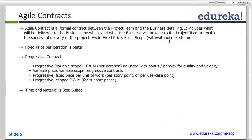There is another sizing method called T-shirt sizing. If I have a huge requirement, I call it XL. If it's a small requirement, it would be Small. So we have Small, Medium, Large, XL, and Double XL depending on how big the project is. In numbers, we generally use the Fibonacci series, which is 1, 2, 3, 5, and so on.